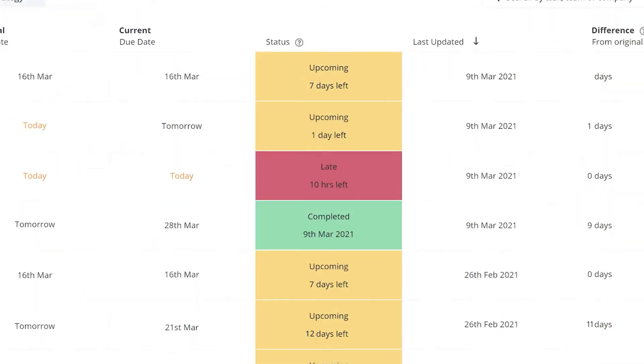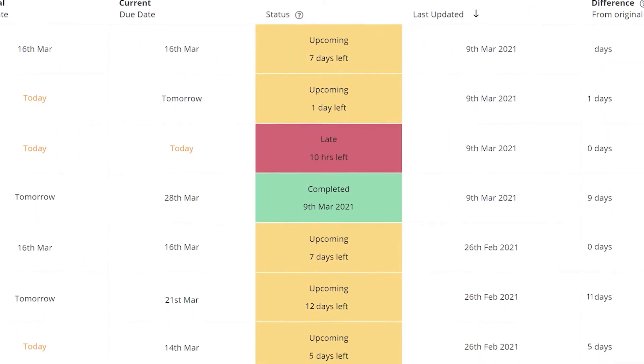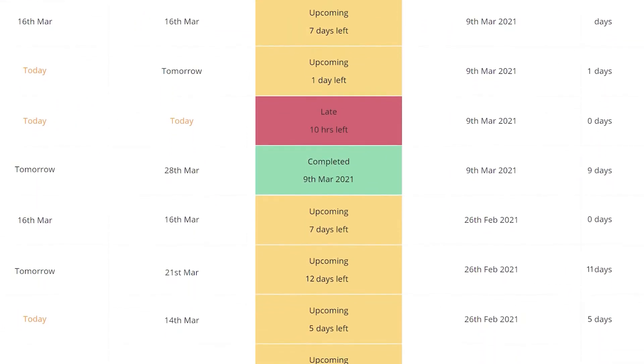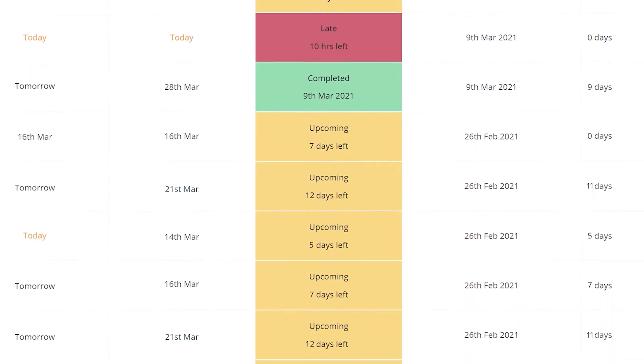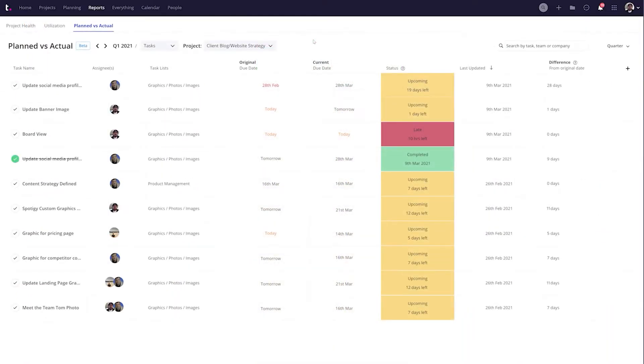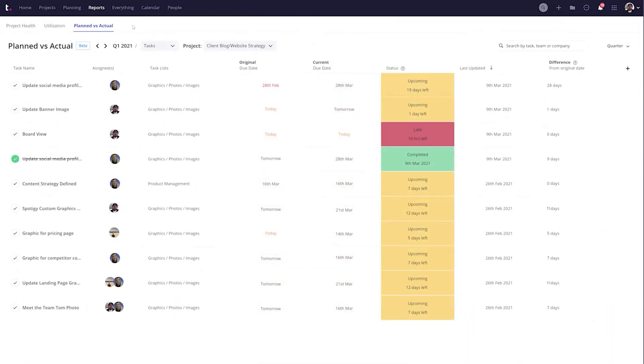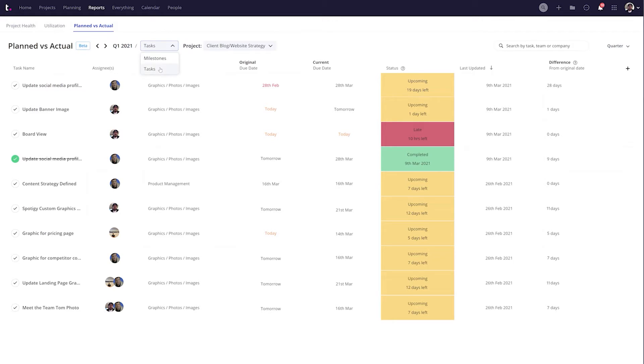For example, there's a planned versus actual report. This report compares how you planned for a project to go versus how it's actually going or how it went, using the time estimates that you entered for tasks to compare against the actual time it took to complete them.